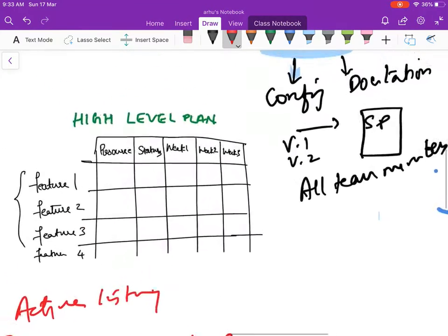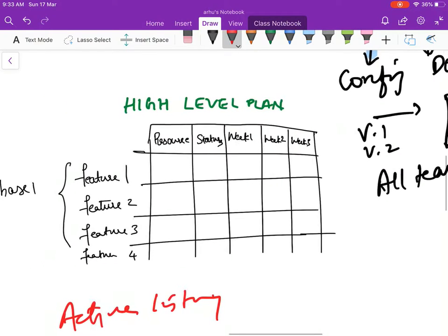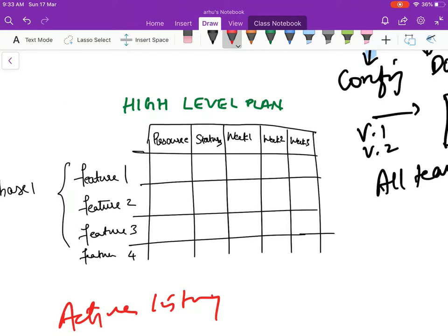Lastly, let's come down over here. I just want to show you the project management plan is a living document. That is, you need to keep on updating this. Let's say for example, the feature one, you have got say one developer and say this is still open who's working on the thing. You're supposed to complete this development in say 1 week, and unfortunately it did not get completed in the 1 week. Okay, it's still open, so you'll have to run through this a little part of the second week. Keep on updating this and then see what changes you have to do.